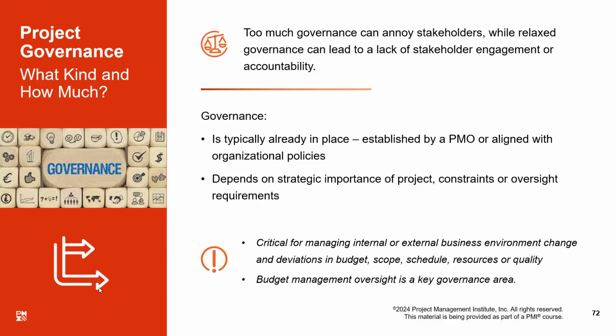They don't feel comfortable working in an environment where they are being given dictation all the time or where they are being micromanaged. So if you provide extensive governance, that tends to be micromanagement, which is a very, very negative impact on the project.